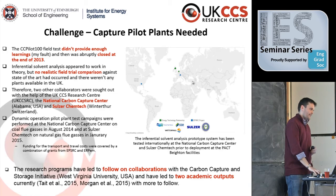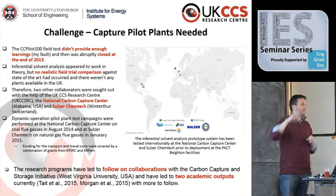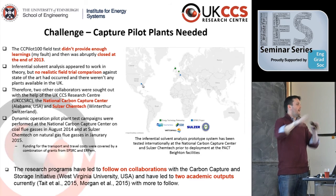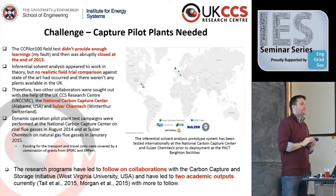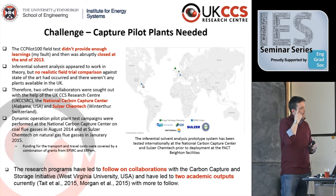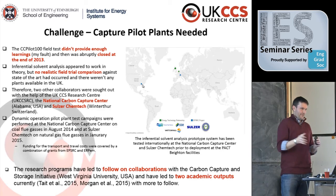This thing was going to fall apart about 3 or 4 times over huge barriers that they eventually all compromised on. The second thing I'd like to tell a war story about is at this plant. Because it had taken forever to get all of these contracts together, I had a 14-day trial. They told me this, 14 days. That was loads of time. I was ready. I planned it all out. I made my little Gantt chart, A, B, C, D, day 1, 2, 3, 4, 5, 6, 7, 8, whatever. That was great. I'm there. I'm plugging it in. On day 0, they tell you you have a 6-day trial. And you only get to go on the plant for 3 days because it's a bank holiday on the Monday. So I could have been screwed again, but I had learned from my first lesson.